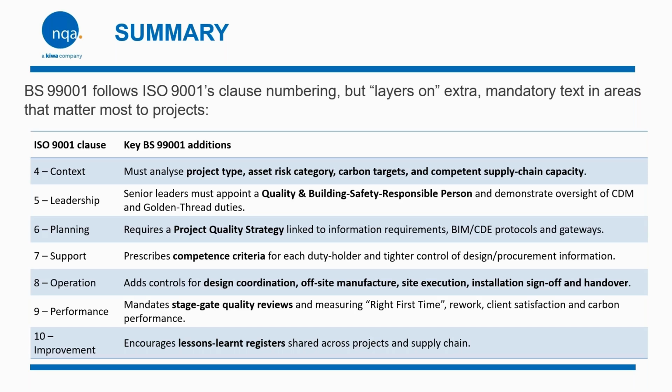Clause 10, improvement, you must keep a register of lessons learned, and you need to share these across all projects and even include your supply chain. This makes it easier to avoid repeated mistakes. And it's not just about recording NCRs or CAPs for audit processes, it's about learning and sharing. So that's a high-level overview of what the standard is looking at.